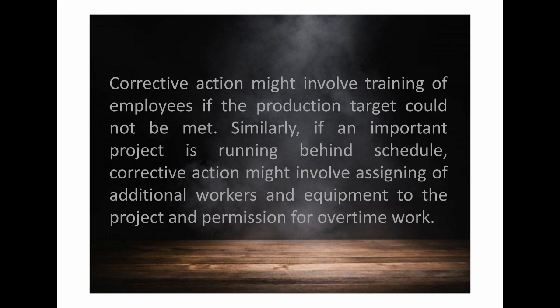If the organization fails to reach the production target, then it is understood that it is only because of the untrained workers or non-trained workers who are available in the organization. If an important project is running behind schedule, corrective actions might involve assigning additional workers and equipment to the project. So there is a lag in time, or sometimes the project is behind schedule, and what has to be done is that sometimes employees have to be added additionally and equipment has to be put in. So all this will come into the picture.